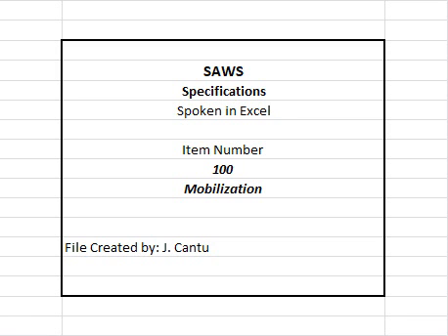Materials on-site are limited to the items listed in Table 1. Table 1: Materials On-Site Payment Guidelines. Materials on-site application: water, recycle, reuse or wastewater pressure main. Pipe: 4-inch diameter or greater, rounded down to the nearest whole foot. Valves: 4-inch diameter or greater, only when bid as a separate line item. Fire hydrants: includes all items for complete assembly.